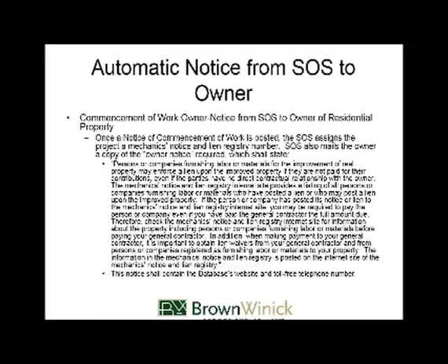Now, the notice that goes from the Secretary of State to the owner says what I have here. And again, they're notifying the owner that liens may be filed. This is similar to the first owner notice that was sent out. And this notice from the Secretary of State says, persons or companies furnishing labor or materials for the improvement of real property may enforce a lien upon the improved property if they are not paid for their contributions, even if the parties have no direct contractual relationship with the owner.